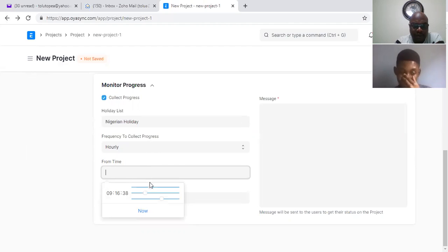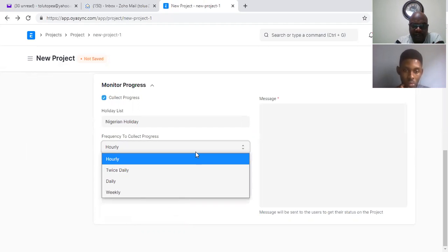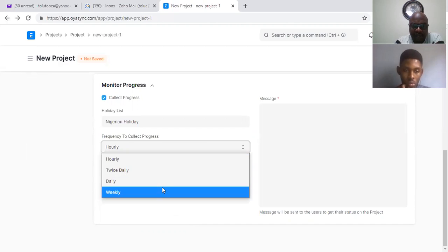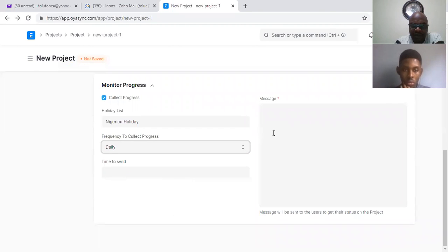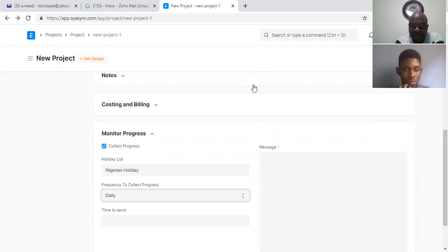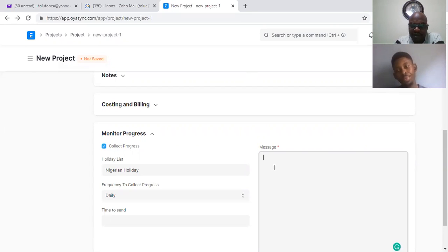Okay. So I'm saying that every morning at 9 o'clock, I want to get my project reports. So what it's going to do is that at 9 a.m. every morning, like I said daily, it's going to send an email to all the users requesting updates on this project.